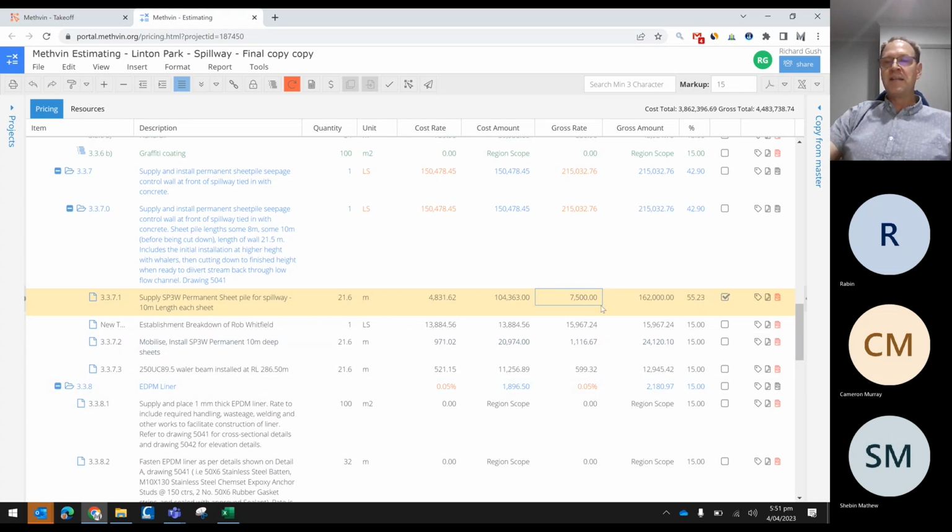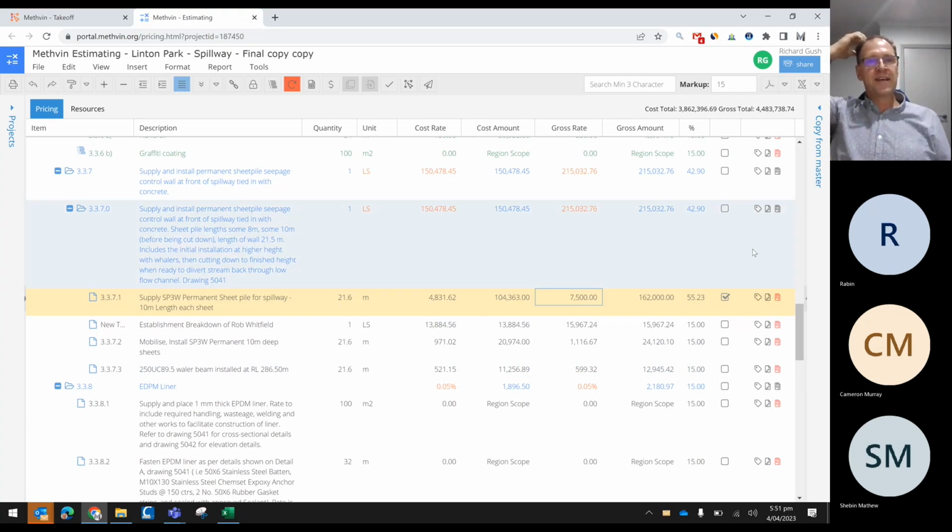And the idea is if you've imbalanced this correctly, when you come to site and deliver this job, you deliver 2,000 of this as opposed to 21, you're going to increase your margin substantially. These things can also play against you if you make a mistake. So use this type of thing with caution. That's all I can say. But yes, a handy feature to have.